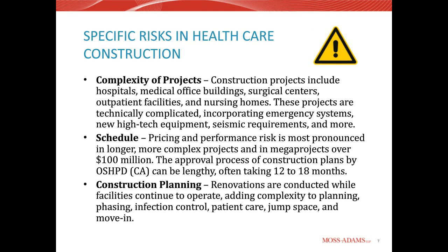If you're undertaking a renovation or an expansion of an existing hospital, there will be different implications on current patients and current end users, so any doctors, administrators, if it's an administrative building. All of those things have to be taken into consideration for an active building. If you're talking about new construction, then it's more of a project turnover and how to efficiently and effectively conduct that without disruption to patients, doctors and staff.